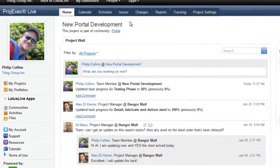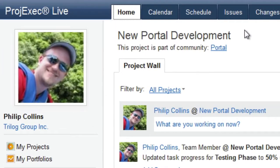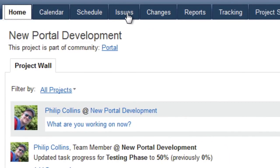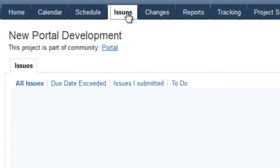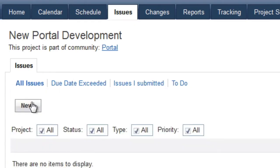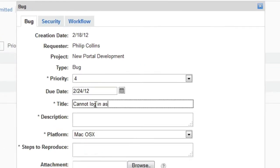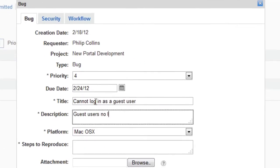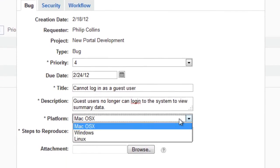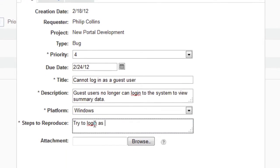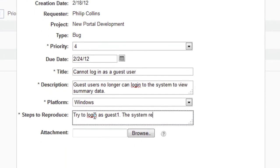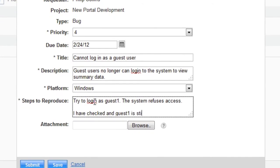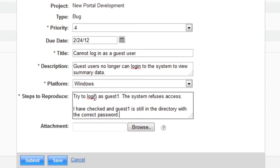For example, Phil has identified an issue. To report this to his project manager, he simply clicks on the Issues tab and clicks on the New Issue button. Once the form is completed, the team member submits the issue, after which it is routed to the appropriate project team member to action and escalation.